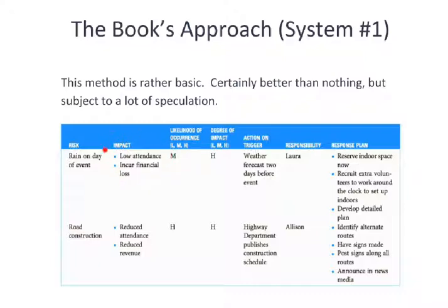If this is an outside event yet the weather is bad, then there's going to be an impact associated with it, low attendance, and possible loss of financial value on the part of us, the project manager and the project team. Because if we have already purchased expecting a large crowd and then we have a smaller crowd, we have a loss on the project due to this unforeseen event of bad weather.